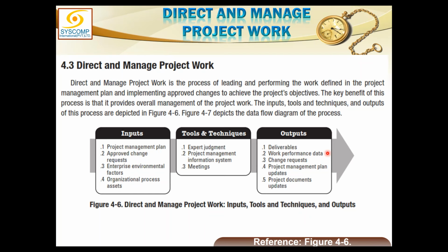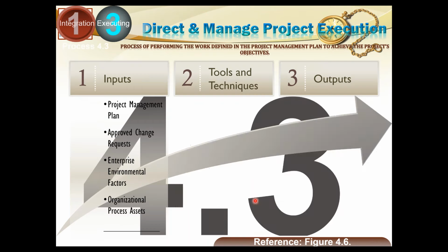We can even raise the change request right from here, or when the data is being analyzed in monitoring and control, the change request could be raised from there as a result of that analysis. But these are those change requests which are necessary, and they do not need any further analysis. It is apparent that this change has to be definitely adopted. And the project plan and documents are updated.